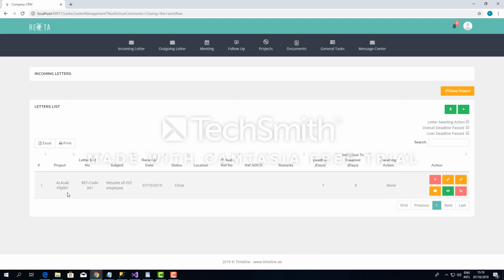If I receive this letter from the sub, then in response, when I'm sending a response which will be through email, not from the system, I'll put another reference code. Once the client receives that, the NOC will respond back to that reference code by using a different reference code. So it's like a complete correspondence.